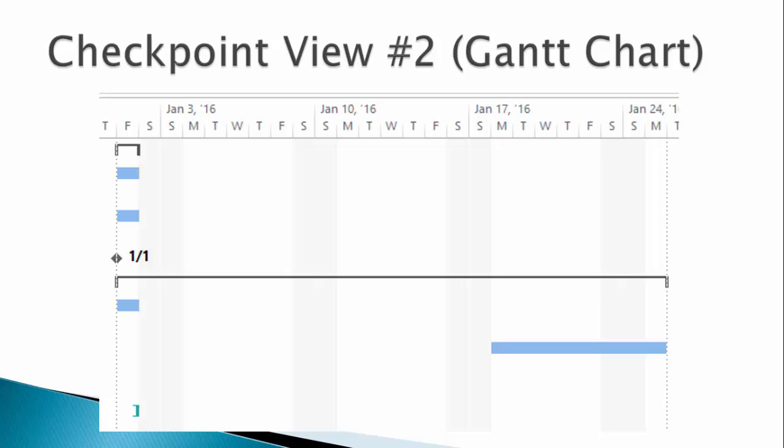For example, the working calendar specifying the weekend days is ignored. Milestones, therefore, are best placed by adding dependencies so they are dynamically updated as plans change. When you are able to get this result, you are ready to start the next video in this lesson.